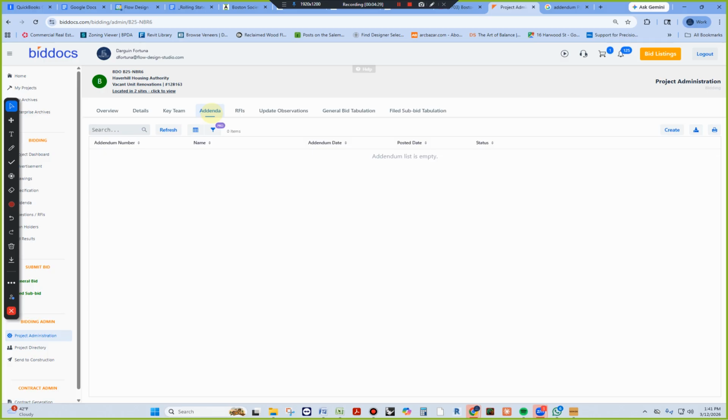There are going to be changes that are triggered by an RFI, meaning a contractor tells us, "Hey, window number 2555 needs to be a tempered glass to my knowledge." You're going to see that, you select them, and then they're going to be included as an addendum when you replace them. However, we do not have an RFI just yet. This is a change that we know needs to happen and we're going to make, and it was not triggered or initiated by a contractor's question.